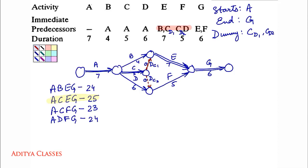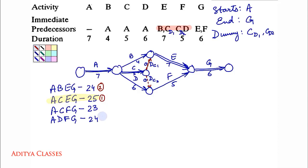Our next step is to make a forward pass and a backward pass on all possible paths, but we will follow a priority starting with the longest one first. So first we go on A, C, E, G; then the two paths of duration 24; and last the path of duration 23.